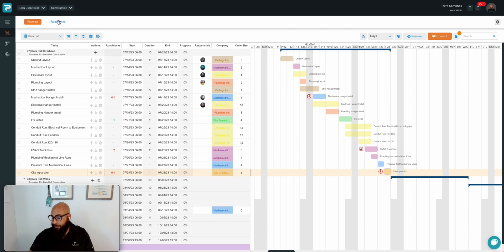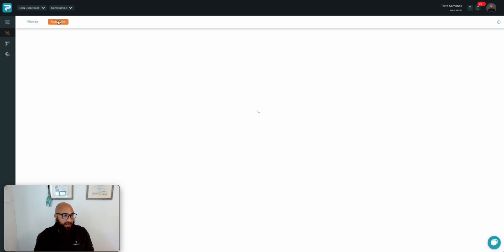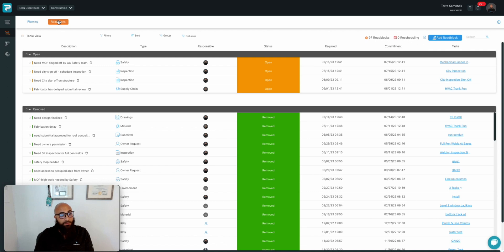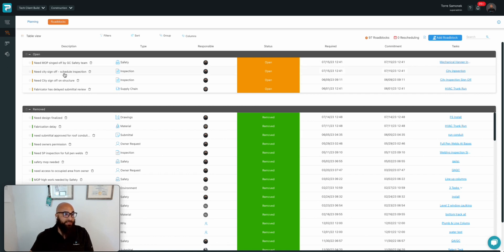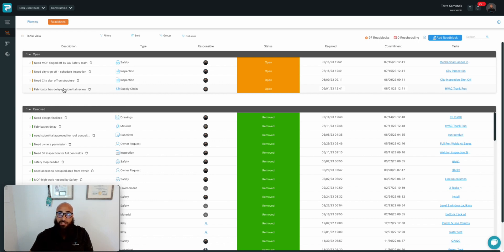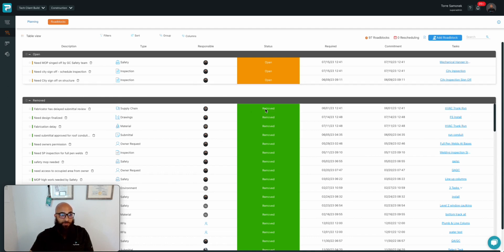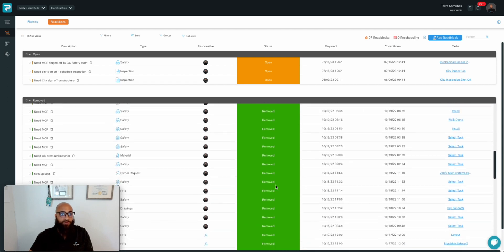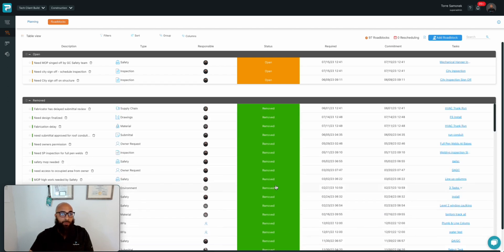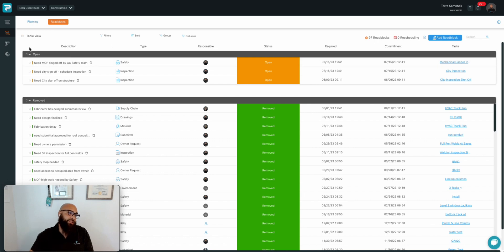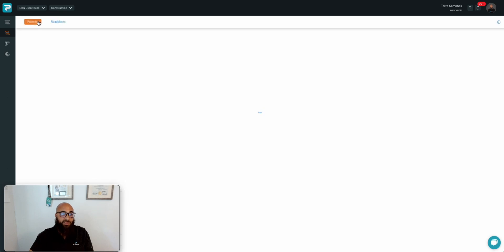Reviewing roadblocks in ProPlanner is as simple as jumping into the roadblocks tab and taking a look at open or removed roadblocks. In this case I can see I have open roadblocks, some of those that we just created together. It turns out that the submittal review from the fabricator was actually turning around pretty quick. Good job, PM. We'll take that from open to removed, dropping it down into the log of removed, but we still have access to everything we've worked through and now letting us know that we only have three roadblocks to focus on for the remainder of this pull plan.